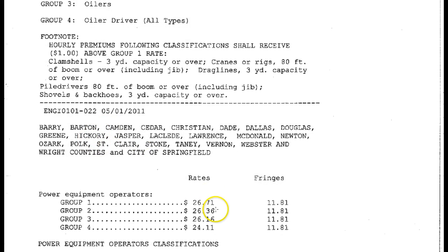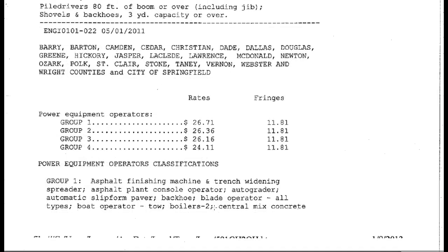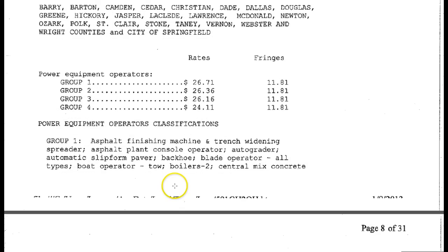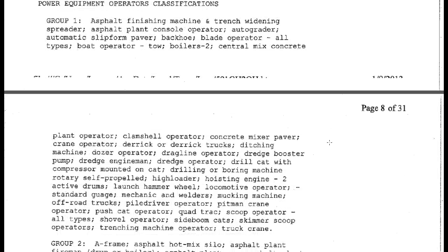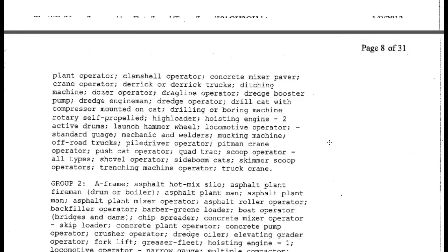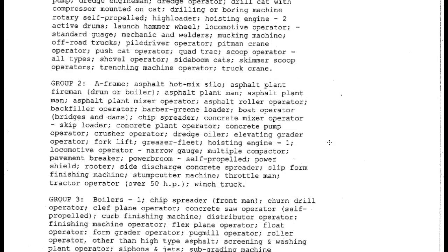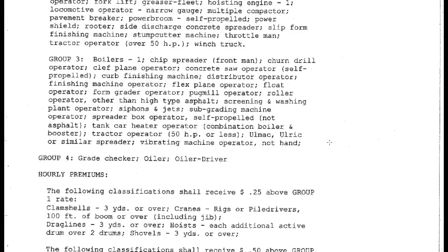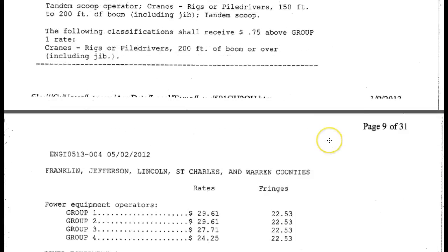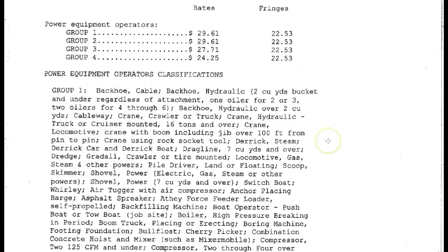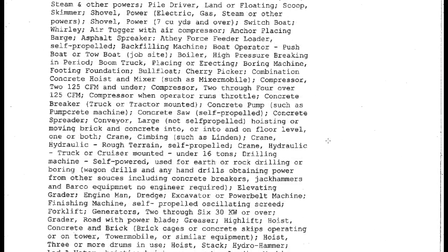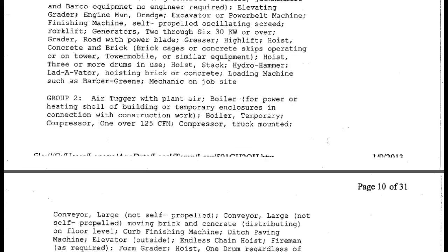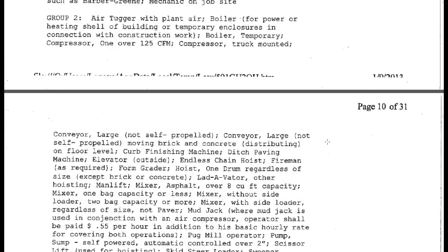Here's another set of counties, and again, you can see by going through how the rates change, and also how sometimes the groups change. You'll have definitions for different groups. Again, it depends on how labor is organized, often how much unionization there is in an area, and that will specify which groups are in that area and change things from place to place. So this will provide you again with the minimum amount that you're going to pay your staff as you make your estimates of cost.